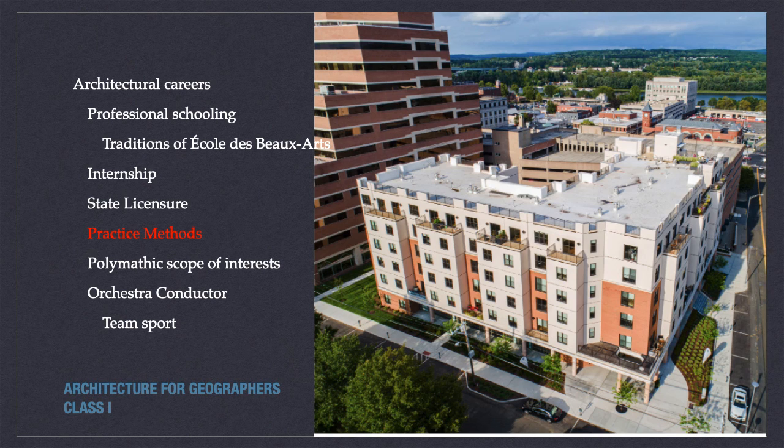The A101 traditionally was called Basic Architectural Services, and that's the most typical approach. You know, it's the vanilla that other flavors are added into to change it around, and so I'm going to describe that for you. And that entails 3 phases of design, then bidding and negotiations assistance, and construction administration.